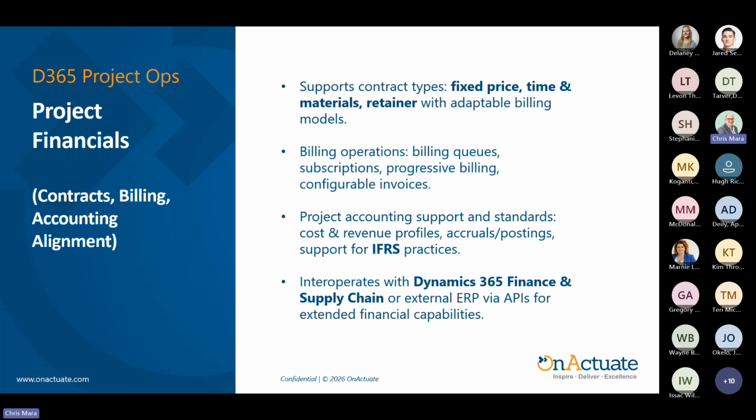So this is where project operations clearly differentiates itself from lighter work management tools. It supports project financials with explicit alignment to contracts, billing models, and accounting requirements. At the front end, Project Ops supports contract types like fixed price, time and material, and retainer, with adaptive billing models to match how project-based organizations actually charge for work or capture costs. Operationally, it includes billing capabilities such as billing queues, subscriptions, progressive billing, and configurable invoices, so billing becomes a managed process rather than a scramble at the end of the month.